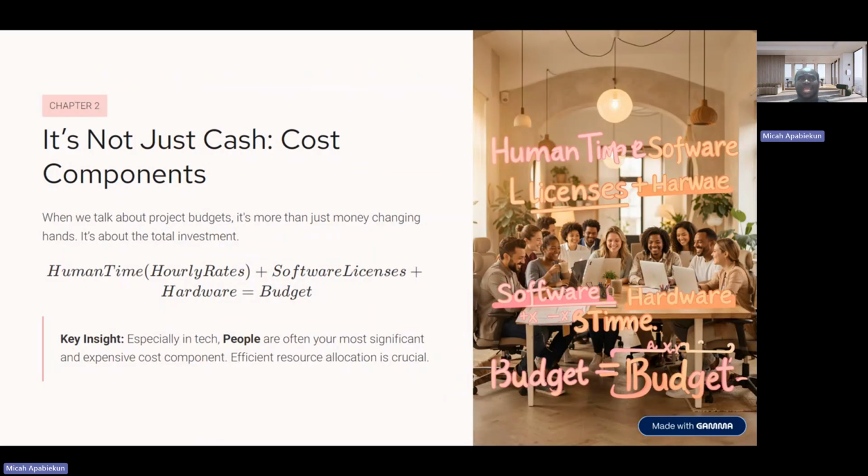You see, sometimes the mistake that project managers often make is that you do the budget first because it's money. Okay, this thing you want to do, this is how much I'm charging for it. You've not really broken it down, but you've accepted the project. When you now accept the project, you get to a part in the project, then you say, oh, sorry, you discover that things are now more expensive in the market. It's not professional to do that.